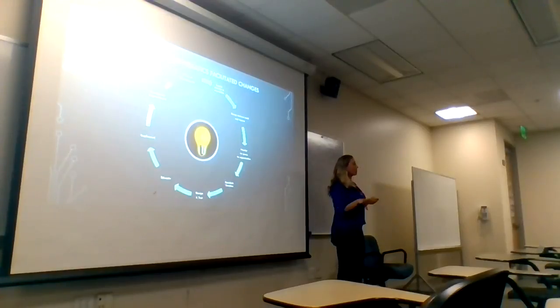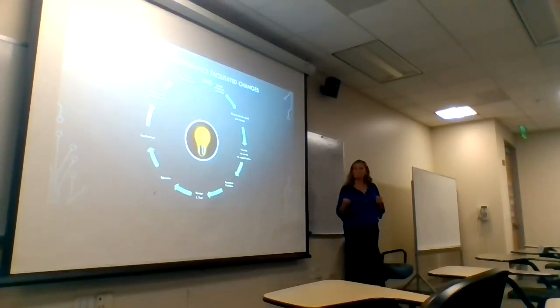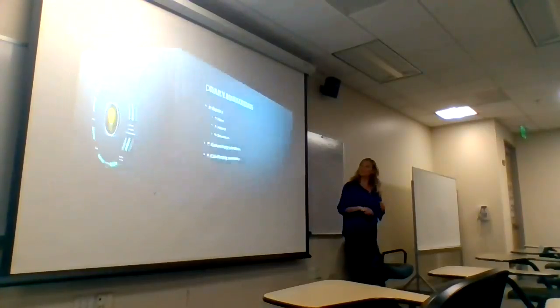The project bucket, from a financial perspective, depending on how it goes and who's in it, has dollars associated with that project. When they're planning that project and doing that assessment, they identify the hours and resources they need, so that can get pulled out of that cost center or budget to make sure they have the right people participating. So it's usually done in the early phases. Good question though.